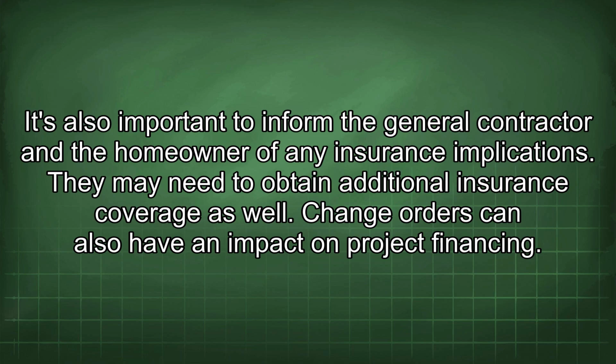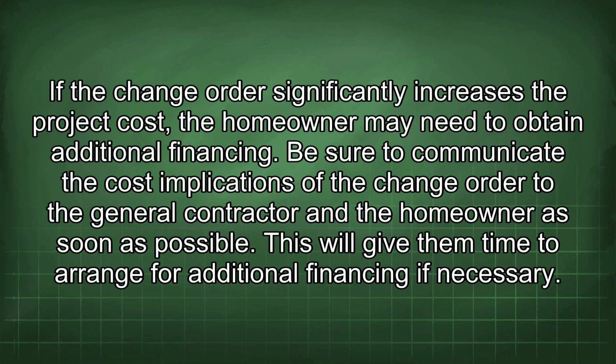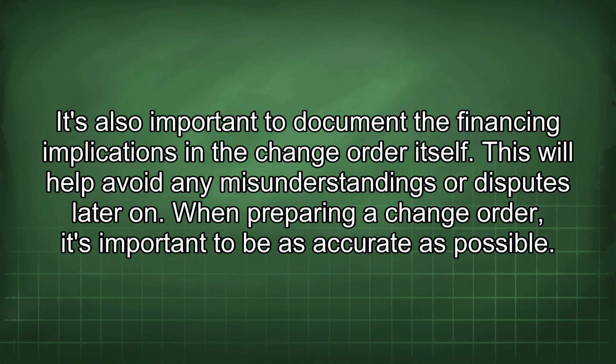Change orders can also have an impact on project financing. If the change order significantly increases the project cost, the homeowner may need to obtain additional financing. Be sure to communicate the cost implications of the change order to the general contractor and the homeowner as soon as possible. This will give them time to arrange for additional financing if necessary. It's also important to document the financing implications in the change order itself. This will help avoid any misunderstandings or disputes later on.